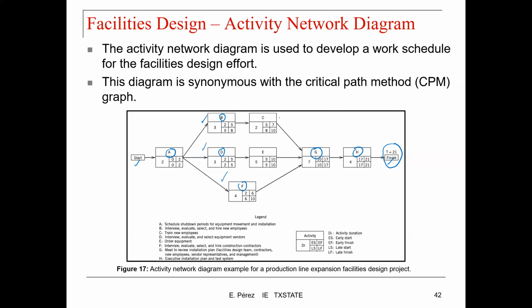You also want to know how long it is going to take to complete each one of these tasks, because out of those 3, the one that finishes latest is the one that dictates when this one is going to start. Using all that information, you can compute the maximum time it is going to take you to complete the process.